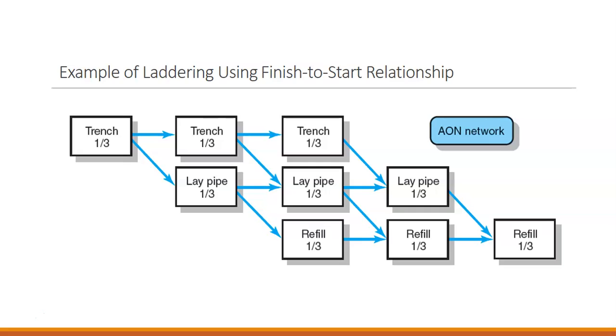This is an example of using laddering to develop a relationship. We've broken things up into 3 components: trenching, laying pipe, and refilling that trench. We can break that up into thirds and start working on different components.